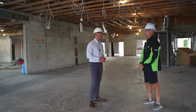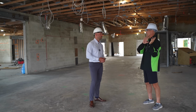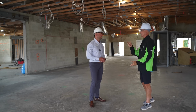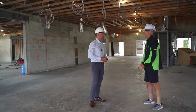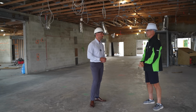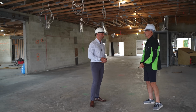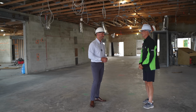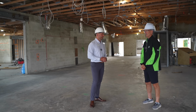So that's the last major outdoor piece of work, but that's slated for the turn of the year, and I think bringing us to early March for most of the completion. A lot of inspections in the month of March right now, and then we'll look for a closeout by end of March. So it's going to be here before we know it. It's moving quickly now. I can't believe it. So I think that's what's ahead of us.